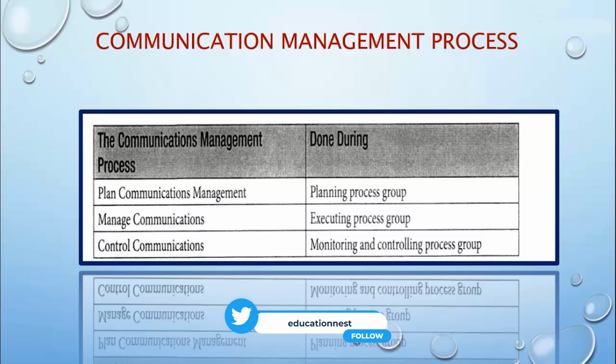You must also take into account the performing organization's established processes and procedures for communicating about projects, its historical records and lessons learned from previous projects, and other stored information. You will also need to refer to the stakeholder register and consult the project management plan, because which customer you are going to communicate with helps you get the key inputs. Also, in configuration management, you have to store this key document. This information will need to be communicated, and it will help you determine how you are going to plan, manage and control communication.